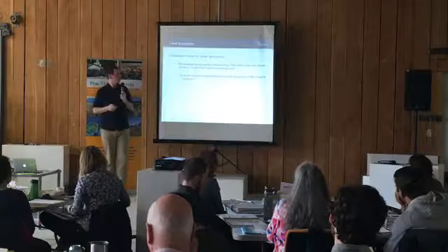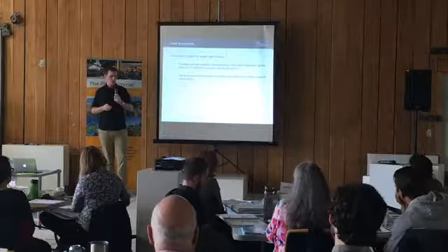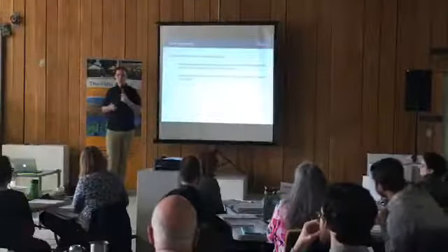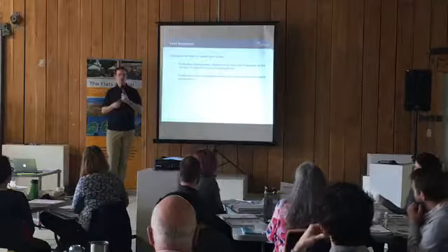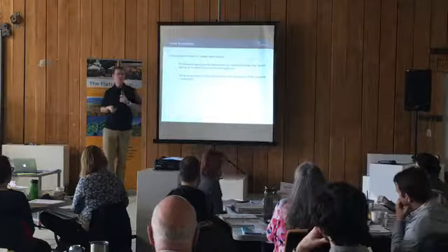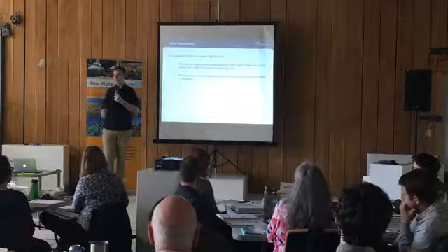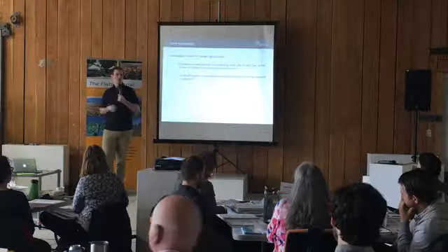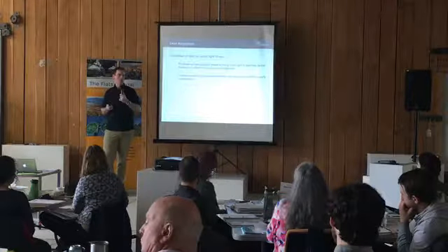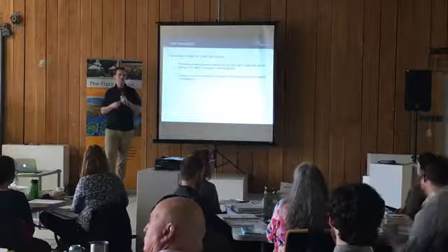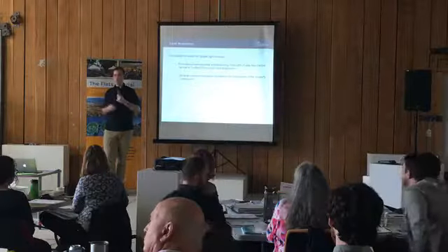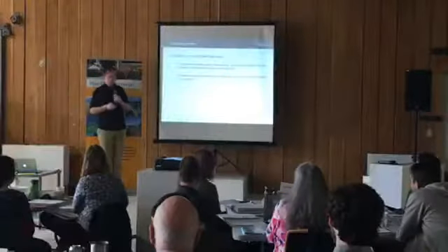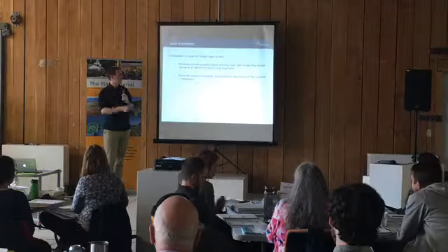Next, I'll talk a little bit about property. One of the key property elements that comes into play is right-of-way acquisition. In some cases, the road right-of-way is too narrow, or is wide enough, but it's not necessarily exactly where the road alignment is proposed. In those cases, additional private property would need to be acquired to provide the road right-of-way. Private property acquisition is a complex process involving discussions and negotiations with each and every one of the property owners that would be impacted.